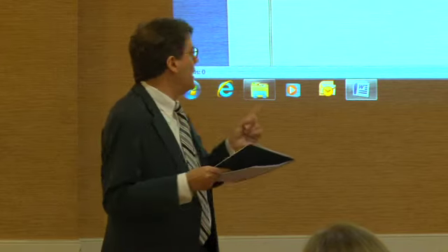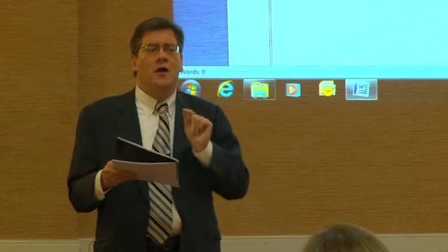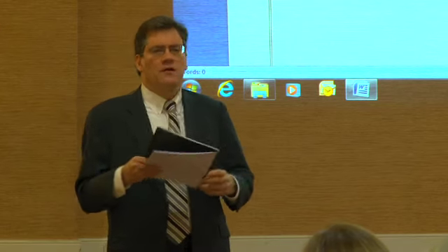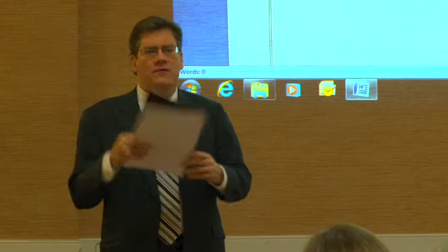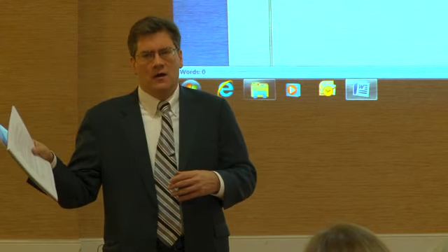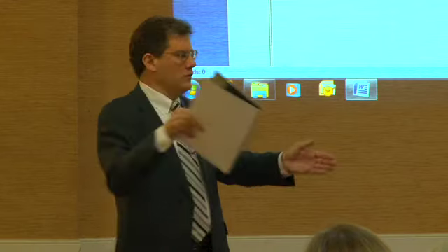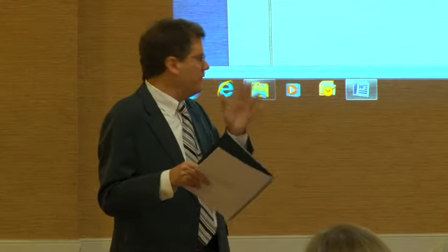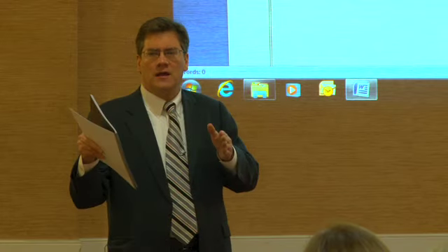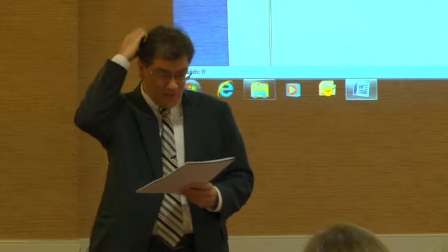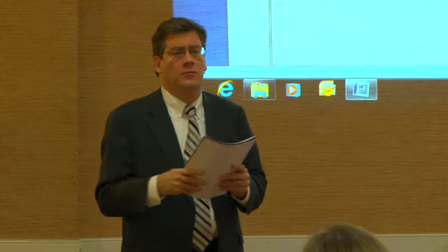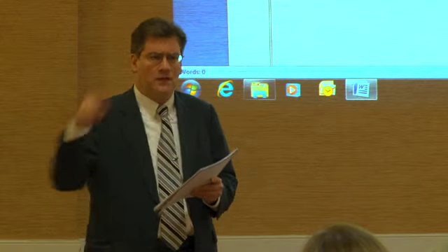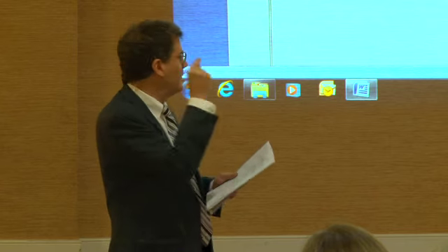Now, the lis pendens also has to get recorded within 6 months of the date of the lien claim. If you file your lawsuit 5 days or more before your time runs out, then you've got 5 days after filing to record your lis pendens. If you wait until the last day of the 6-month period to file, you've got to record your lis pendens the same day.